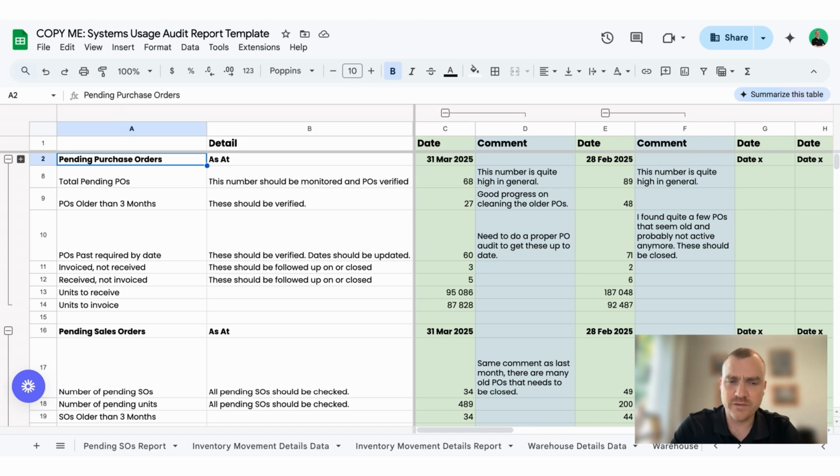Then you know, well, if there's a big order incoming in 2 weeks, and we've got 30-day supply terms with our suppliers, we know we will have to spend that cash. So you can easily help calculate your cash flow by keeping it up to date. But in general, it's just good hygiene, and it will help with the warehouse to understand when they should expect the stock to come in.